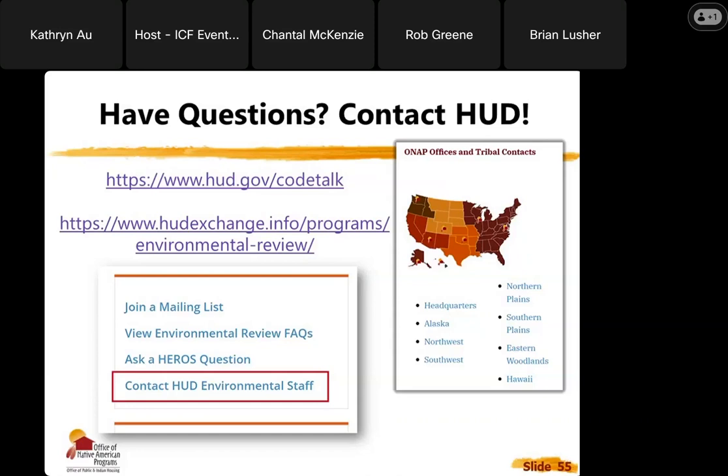And the PA can also, as Catherine talked about, clarify the need to not consult for certain projects on properties that are not yet 50 years of age, which would normally require a review with the State Historic Preservation Office.